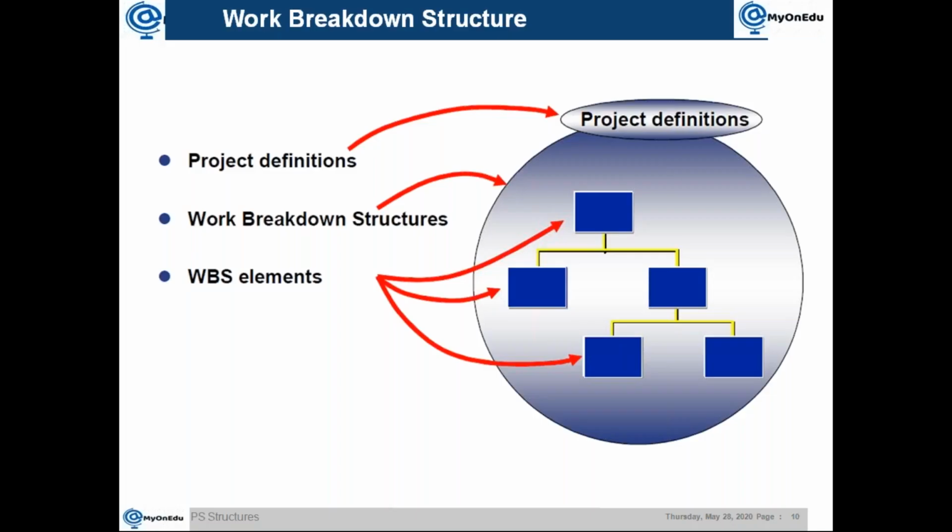So the project definition will be there. This is something extra when you are comparing to other software, but it is technically required as a part of SAP. So that is how SAP projects are structured. It will start with the project definition. Then under the project definition, we create WBS elements. As far as our WBS element concept is concerned, we call the first one the root level. So it will be the first one, then level 2, then level 3.